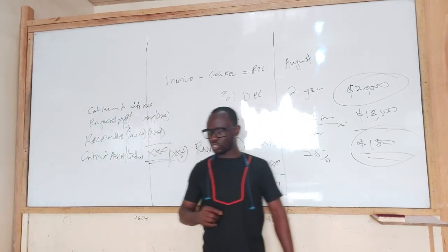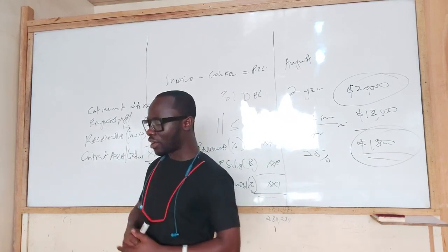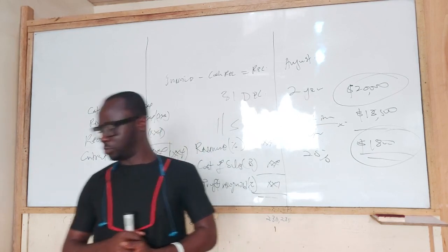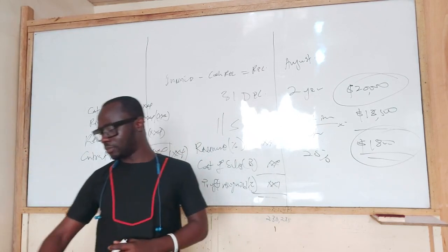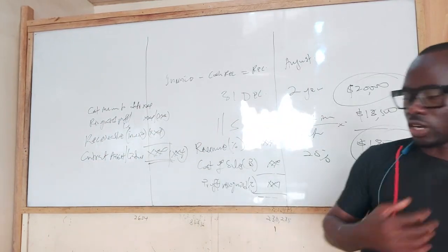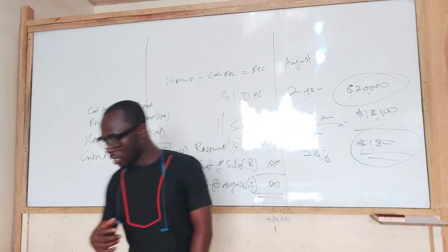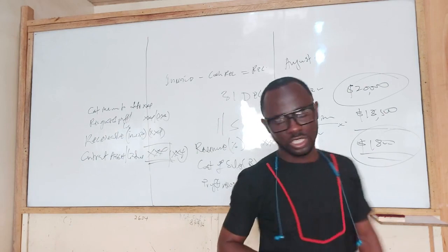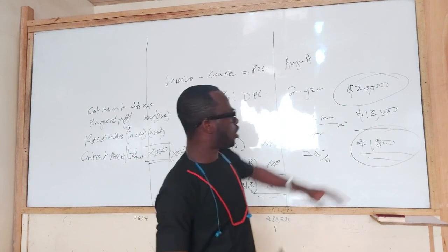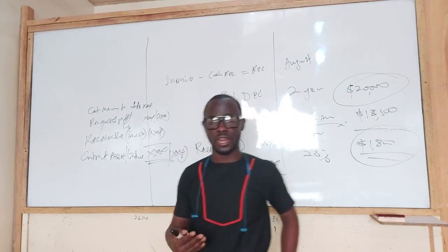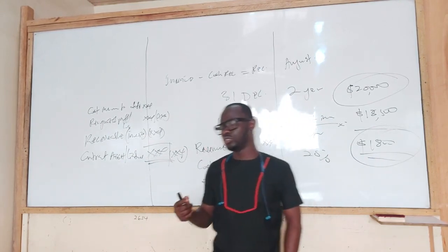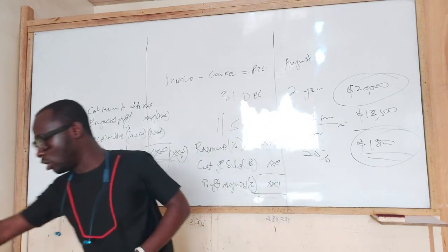A fixed price contract is a construction contract in which the contractor agrees to a fixed contract price or a fixed rate per unit of output, which in some cases is subject to cost escalation clauses. So these are clauses. These are the two ways that a contract price can be done. With a fixed price, we agree, as I said, $10 million, boom, you go away. Or better still, we are going to be charging rates per unit or per output.